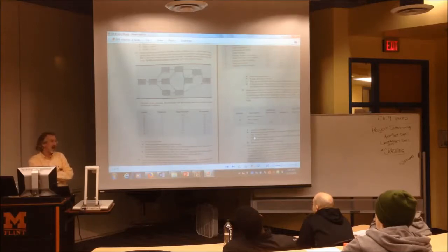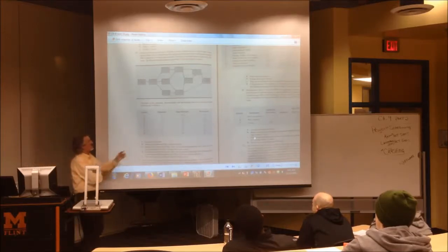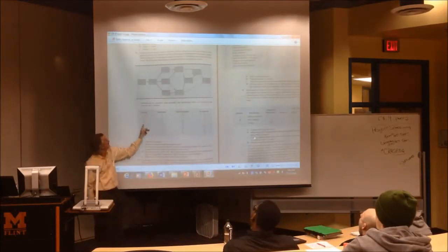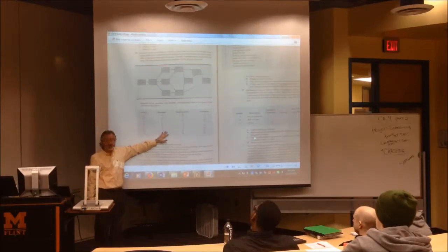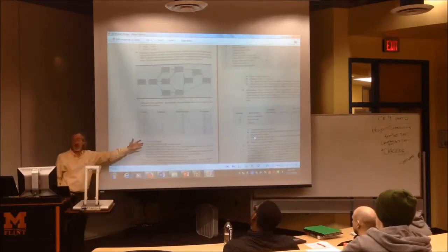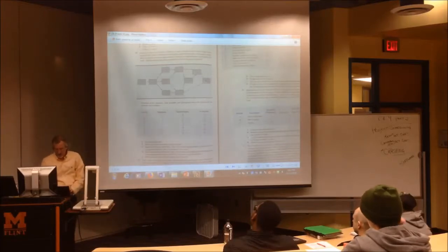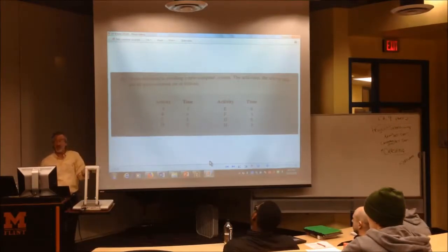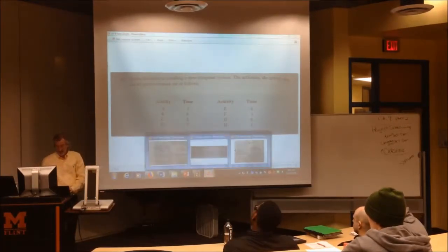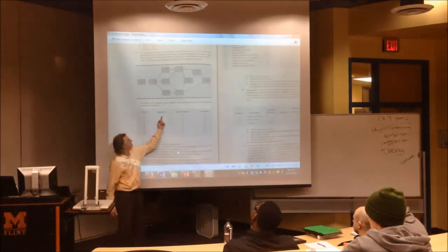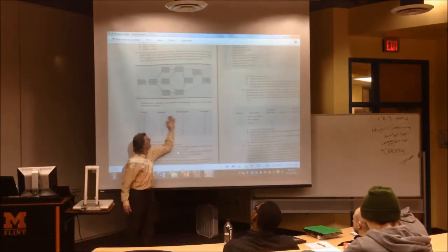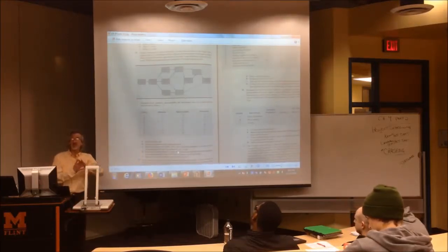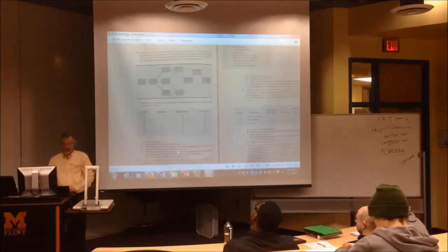Now, if you're kind of not getting this yet, you need to catch on that when you see there's 3 different times, most probable, pessimistic, optimistic, for each activity, that's what's trying to tell you that this is estimated activity times instead of known. And when you see the activities like this, where there's only one given time, that's known activity times. And the difference is that when you have this, you've got to take a step where you take these 3 times for each activity and convert them into expected activity times, so you can do it just like you did if we had known activity times.